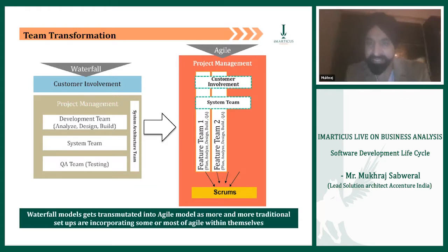So guys, I read this question, for example, from Raj. It says, in any case, if something goes wrong in waterfall, do we have the option to go back? Yes, Raj. If we find out during coding or testing that something has really gone wrong, we can go back and we will go back. But it will be a very expensive exercise. Because let's say we wrote a wrong design. It traveled to coding, wrong code was written, then it traveled to testing, and then the test cases failed, and then we realized something was wrong. So waterfall is fine. We have been doing waterfall for the last 20 years now. But it turns out to be a more and more expensive proposition to use waterfall in pieces.